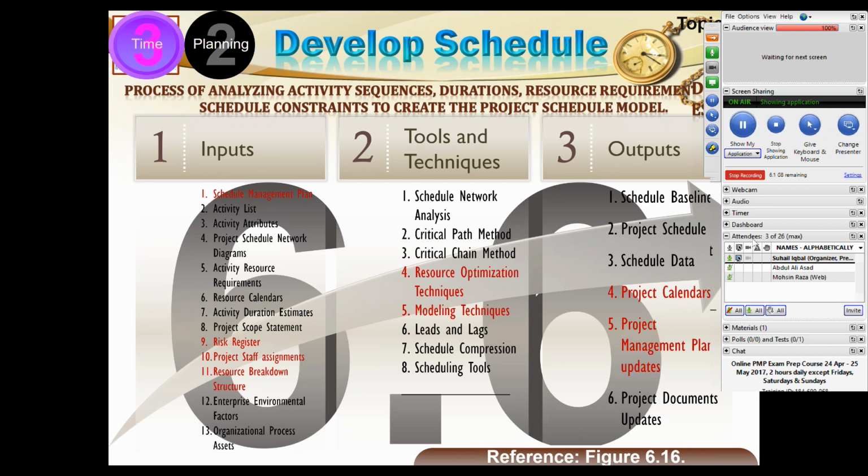If everybody has given him 1 day, say on the critical path there were 5 activities, so 5 days will he gain. That means the project of 59 days will have 5 days of buffer and 54 days for the activities to complete.